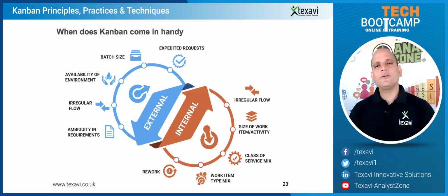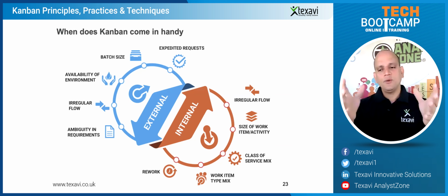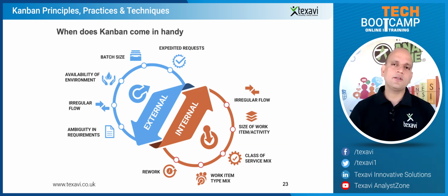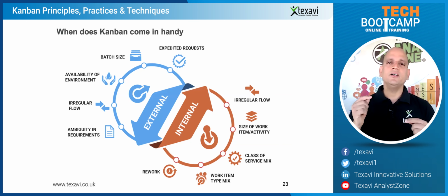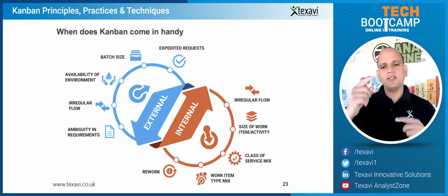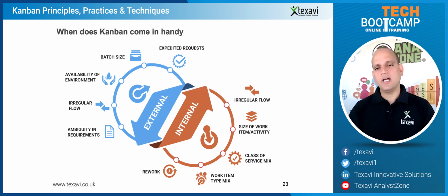All of that you're trying to get in, and you're trying to prioritize. For example, Sonos is a multinational corporation with its products available everywhere in the world, so if you've got thousands or millions of people asking for one request, obviously that means it is a most wanted, most sought after feature. So Sonos would put that, for example Dolby support, high up in the system. The prioritization, again, the MoSCoW system would come in.